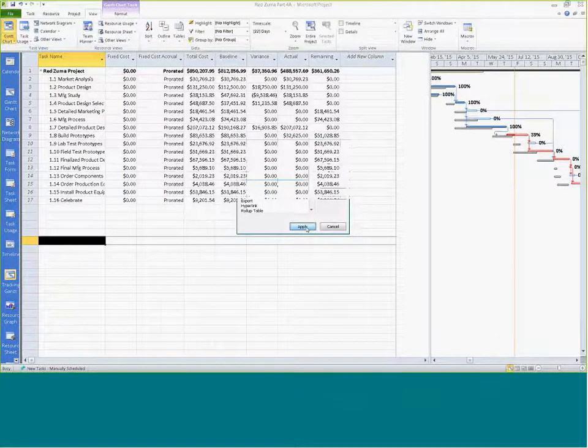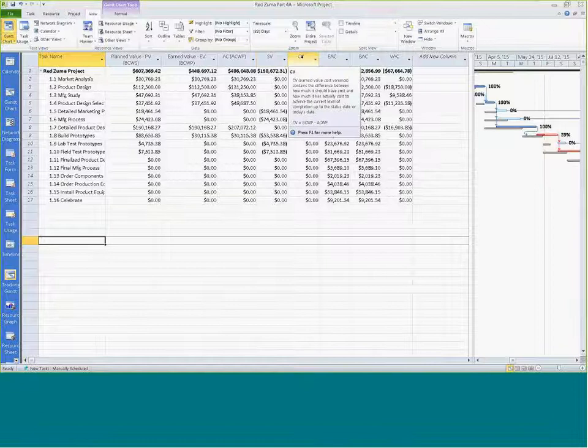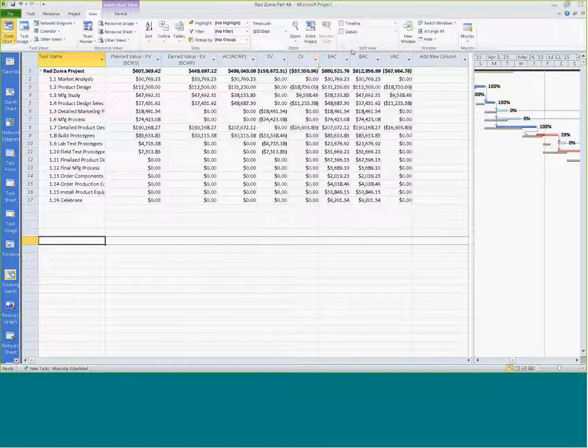It does include schedule variance. It includes our cost variance, the variance at completion, all of these various things that we want. So estimated at completion and budgeted at completion, you can see that's where the variance at completion comes into play. We're not through the project, so this project could come back in alignment.